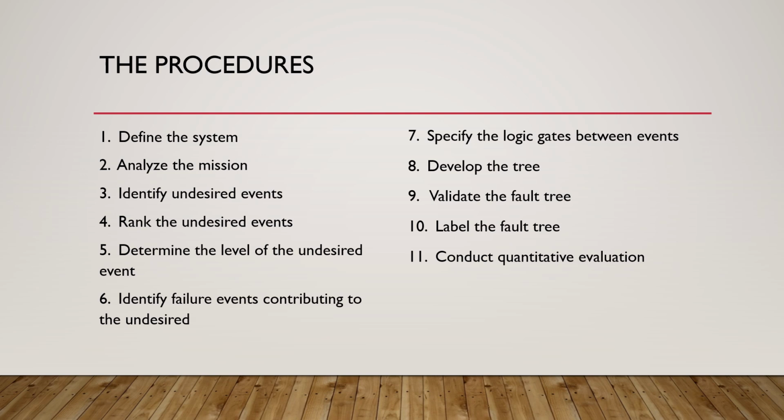A quantitative evaluation is not necessary for smaller fault trees, given the ability to visually assess the data. However, large trees typically enlist computer programming and calculation. Upon completion, the representation and data provide critical paths, sequences of action or activity that indicate causes of failure within the system, and in this aspect, remediation measures can be incorporated to avoid these problems or mitigate risk accordingly.